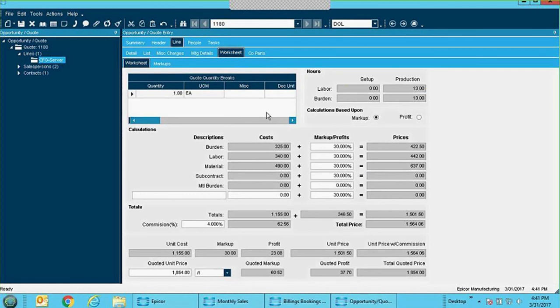So installation, and you can vary the operations and the materials. This is the worksheet saying how much it's all going to cost. You can see how it's priced it out for me. So again, in the first instance, we said you can set it to say, here's the recommended price, you adjust the price. In this case, this is the recommended price, and this is what I want you to quote out, because that then gives you variation and space.